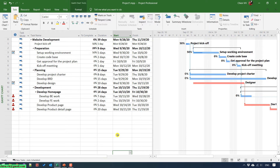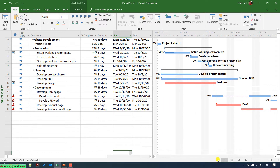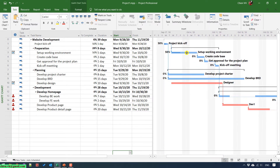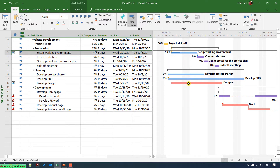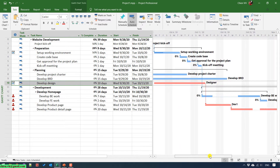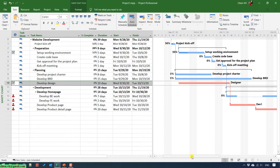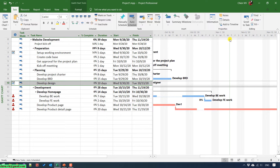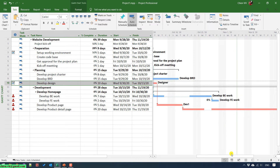Assuming this one is a project plan I'm using for my project. On the left hand, you can see this is the list of tasks I have to finish in my project plan. On the right hand, this is the Gantt chart where you can see the progress of our project. There are some tasks in blue and others in red. The color in blue means the task does not belong to the critical path. Tasks in red belong to the critical path. When you look at the Gantt chart, you see a green vertical line — this indicates today's date.